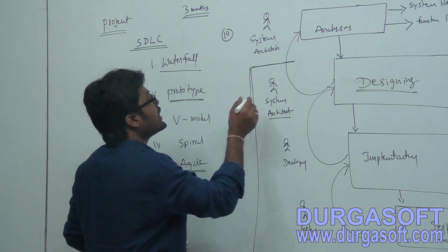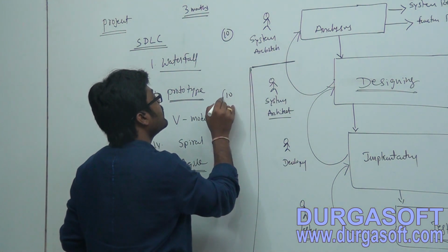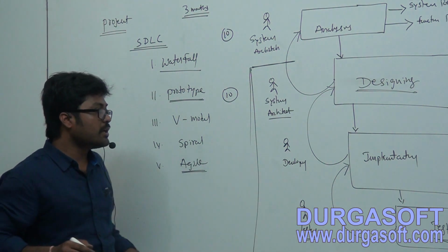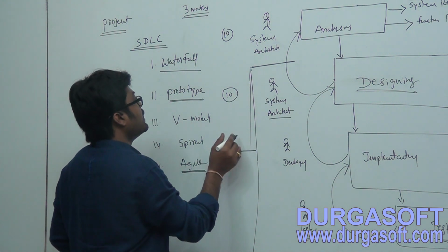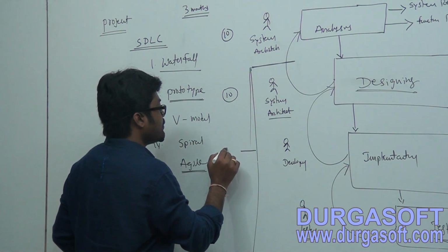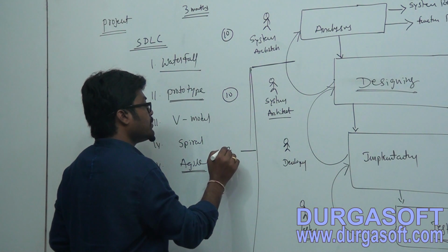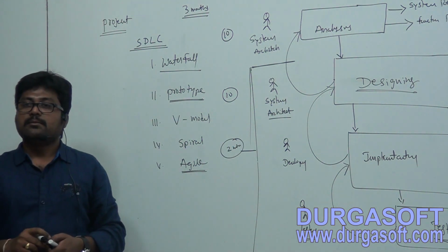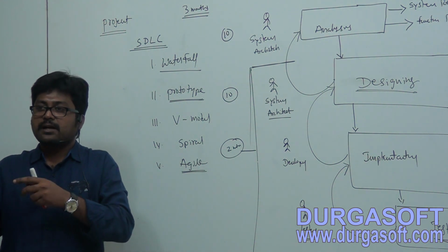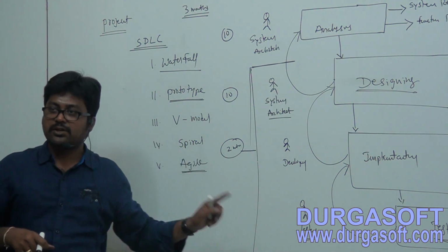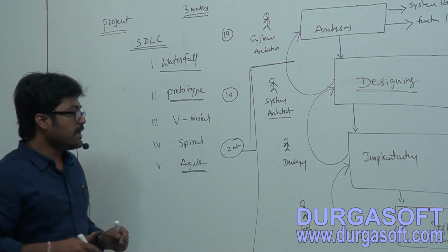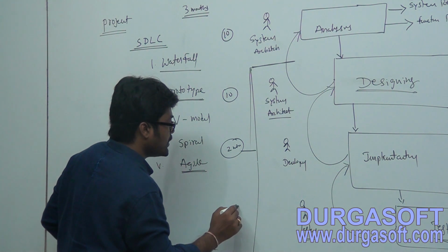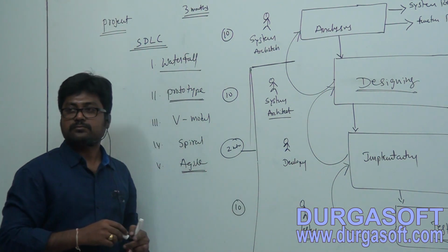And when it comes to the next phase, for doing designing, if you take 10 days, 20 days, they need to wait. The developer and tester need to wait 20 days. For doing development, if you take some 2 months, up to the 2 months the tester needs to wait. If they take those resources for that particular project, they need to wait until this is completed. Finally, they will assign that code to the tester. Then in the last 10 days, he needs to do the testing.